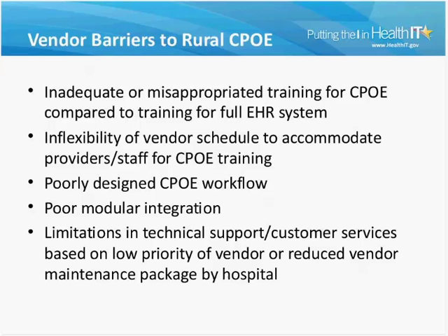Many times this CPOE implementation is not considered a project. There's a lack of project management or project management expertise in these facilities. And so that results in a lack of time allocation, not enough dollars, and the training schedule is not clearly defined if there's not a good project management documentation. There's also inflexibility of vendor schedules to accommodate providers and staff for CPOE training.